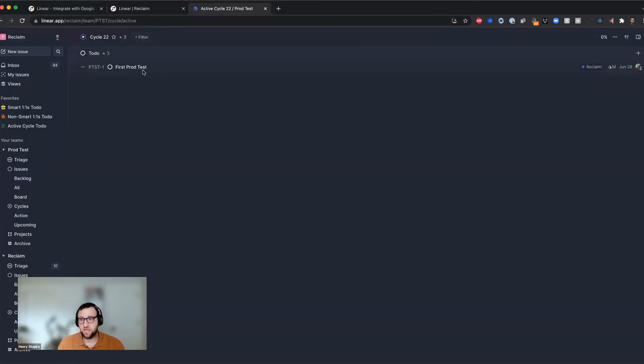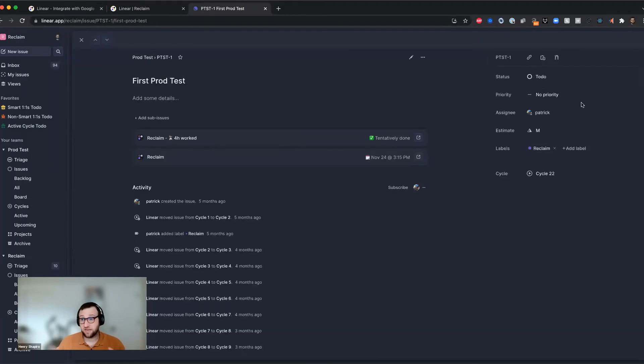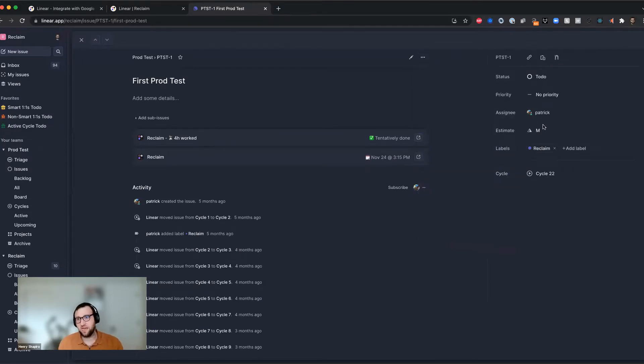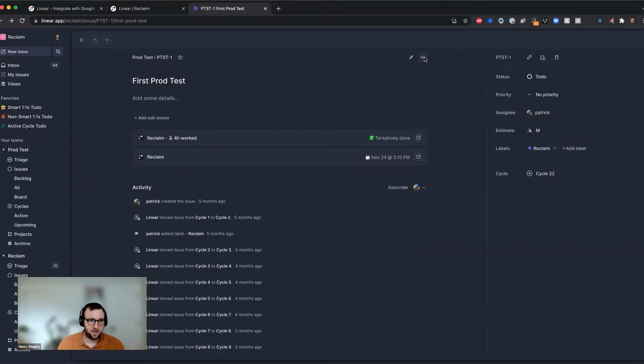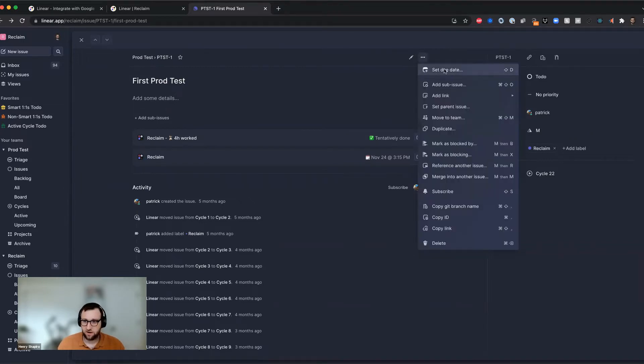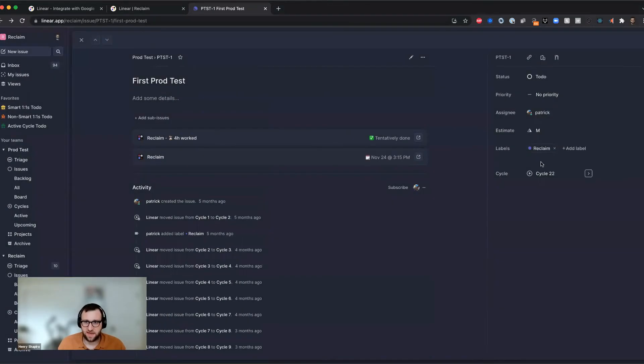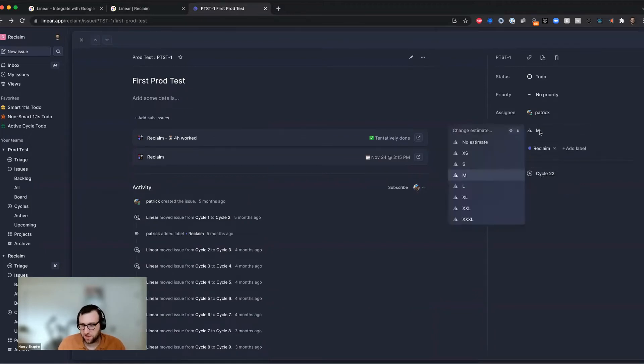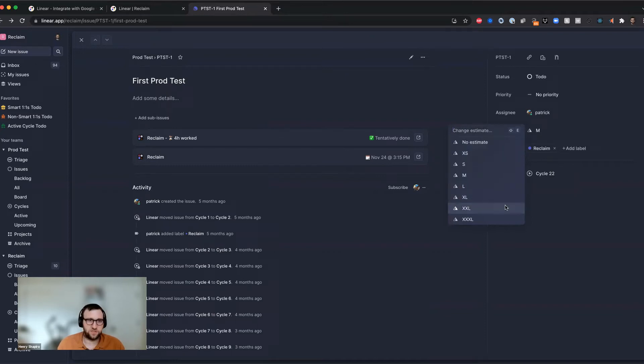And then we also need some kind of date that tells us when it's due. So if it's the cycle, we'll use the end of the cycle date. If it's a custom due date, like the one that you might add in here, I can see that I have a due date here that I can set. I could set the due date for each issue, or I could just use the cycle date, which is going to be whatever date the cycle ends on.